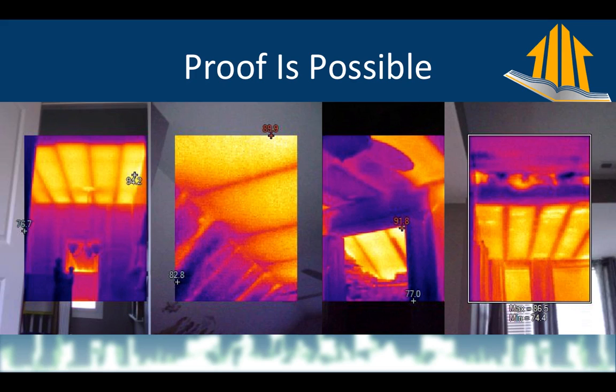So in all of these cases, these are ceiling cavities that we assume should be insulated, because why would they not be? Why they would not be is because, oops, we forgot. And then, oh, the drywaller arrived, and he just put up the drywall, and yeah, it was too late, whatever. We might not even have realized there wasn't insulation in these places. This is ridiculous. There is no excuse for any of the things I found in this house as far as the insulation goes. And I find this kind of stuff all the time.